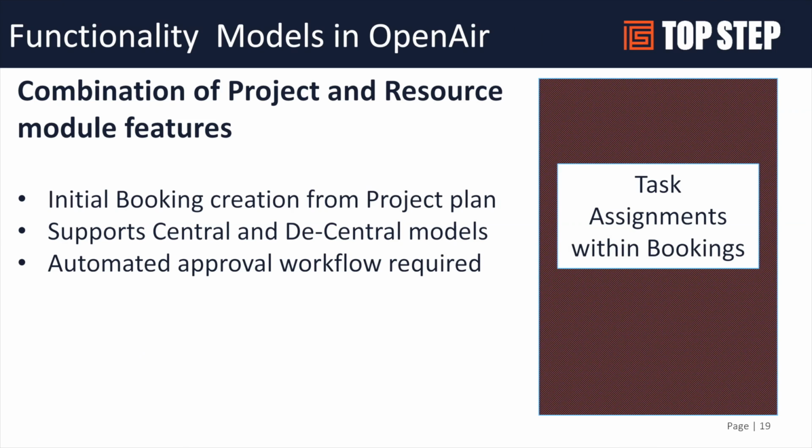Task assignments and bookings. This has been the great debate for many OpenAir customers for years. Task assignments versus bookings: when to use one versus the other, or how to use them together in tandem. OpenAir did put in a feature to be able to take a project task structure with resources, generic resources, and use that to generate bookings.